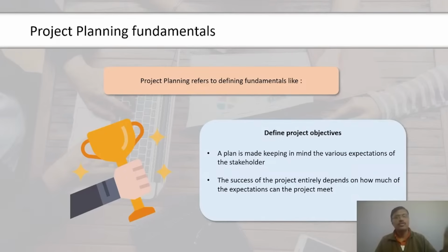It is the aim of quality assurance activities to ensure that the activities planned under quality planning phase gets executed for the project. It is the task of quality assurance to determine if the project is complying with the organizational as well as project policies and procedures. This is ensured by conducting regular process audits to identify deviation from what is planned in the quality management plan. These audits are generally done by quality departments of the organizations. Quality assurance focuses on the process, not on specific products.